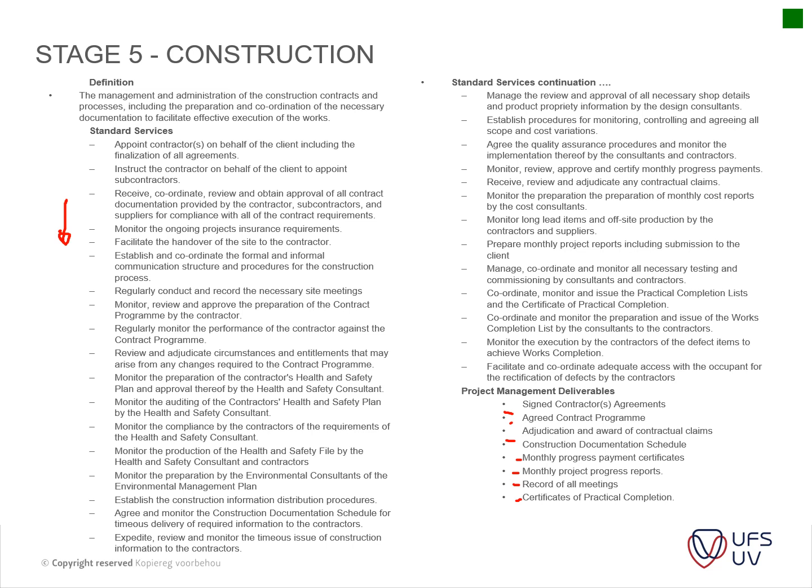Simple things like the dates on when drawings are issued. If the contractor makes a mistake, perhaps on levels, you can see, okay, did he do it according to the drawing? Did he work on the latest drawing or not? Small items like that are very important. So bookkeeping and administration is extremely important on any project.